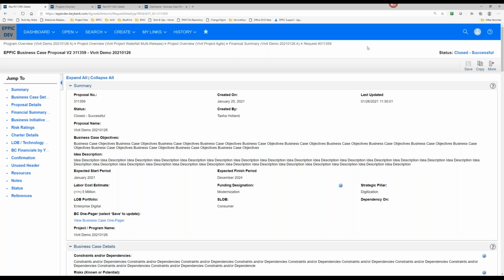If there is a large change or change request, perhaps like an acquisition, are you expected to go back and adjust the original business outcomes on the project proposal, or do you somehow handle it on the value attainment portion? So if there is a large change request, the expectation is that the teams are keeping their expected benefits up to date.